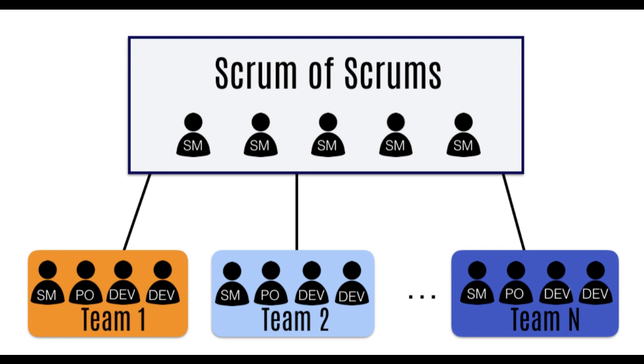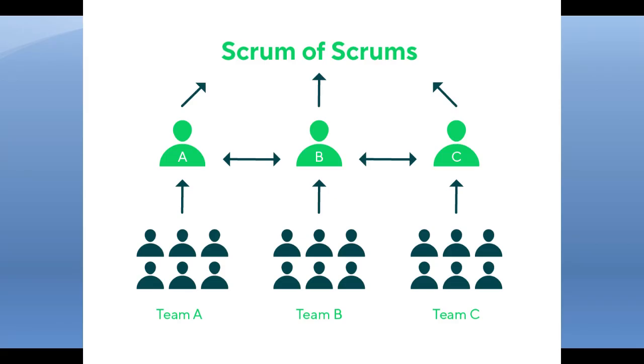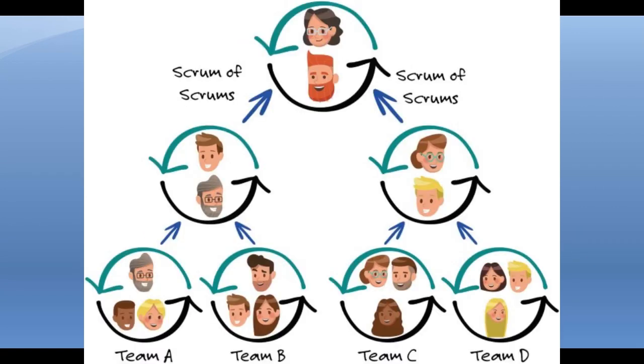A Scrum of Scrums is basically a meeting in which a representative from each team participates, and they briefly discuss the daily things which are going on. Each team continues to conduct its own daily Scrum and manages its own backlog independently. However, in the Scrum of Scrums, the representatives discuss their thoughts, issues and problems, so everyone knows what is actually going on. They have the visibility, or maybe it's also possible that one team member can help another team member as well.